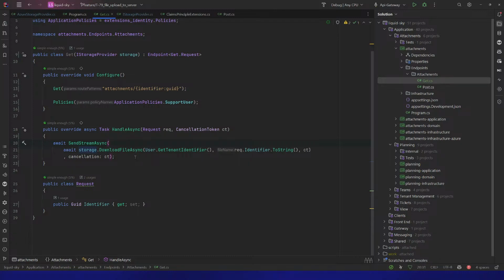Right? Again, the stories that are to be pointed being laid out ahead of time also help, because you can do any prep work. So what I expected is, if I have 5 stories, I'd send them around to the team before we do the pointing session, and the team should review them and make themselves aware of what those stories look like, so they can pre-solve any questions or challenges they have about that work. And then the pointing is focused.